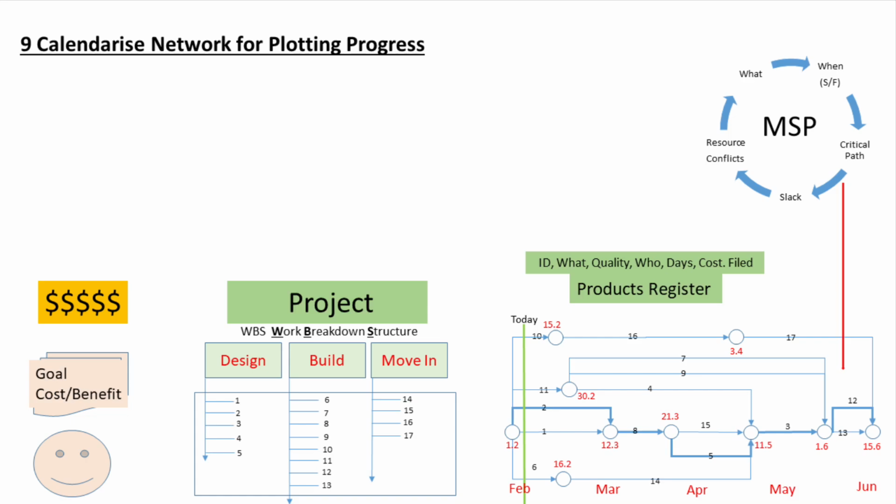Also very useful is the information calculated by the software being the slack times for each activity. That is the number of days we could delay that activity without affecting the end date for the project itself.